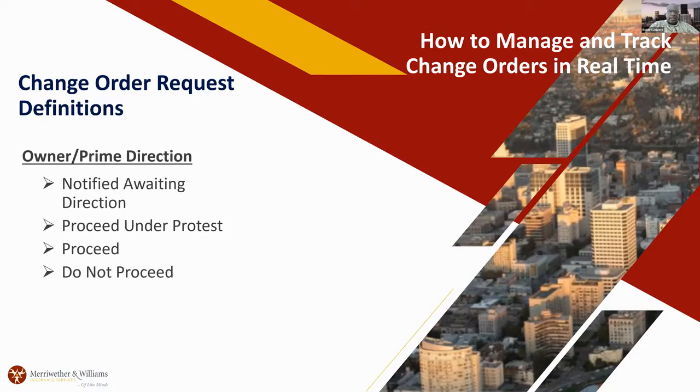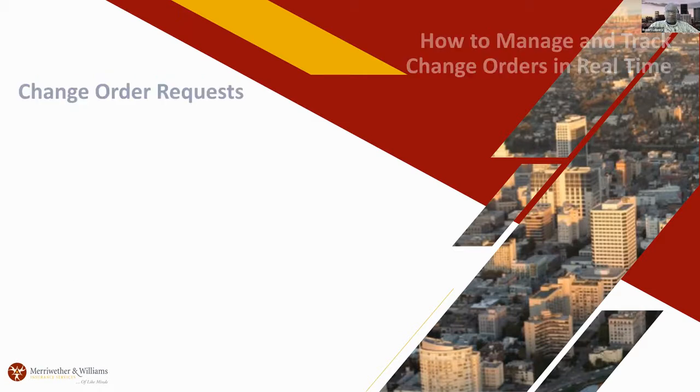And the key thing with change order requests is that it's like telling a story. You have to have the right documentation to go with it: your formal directive, any emails, anything that needs to go into submitting supplemental documentation to tell your story. Just like when you go to court, it's a case. You want to win your case. You want to get your money. So that is how you want to track your change order requests. Next slide, please.